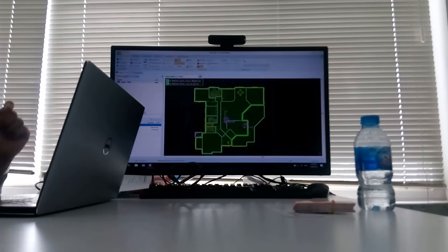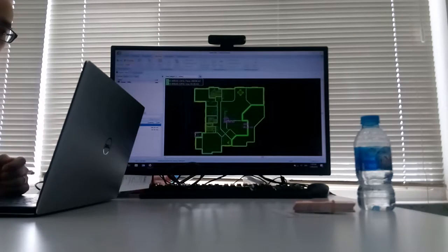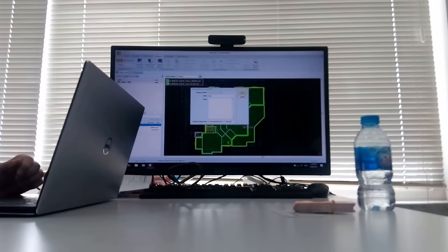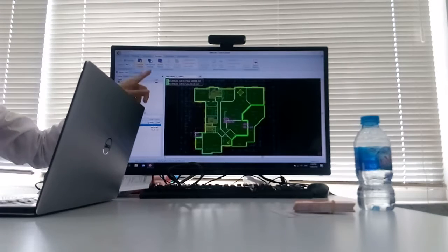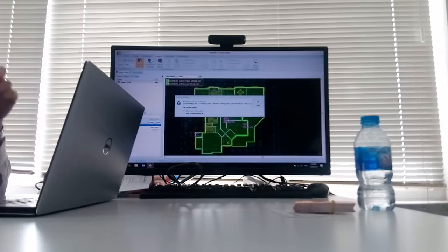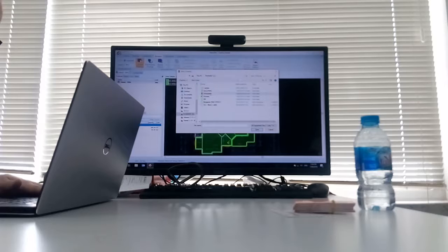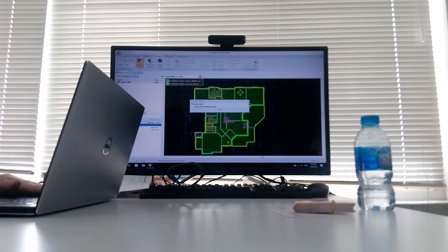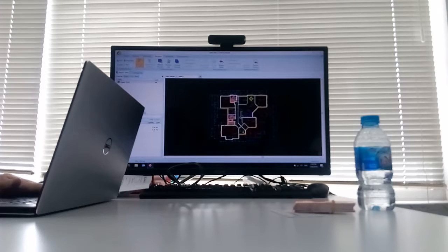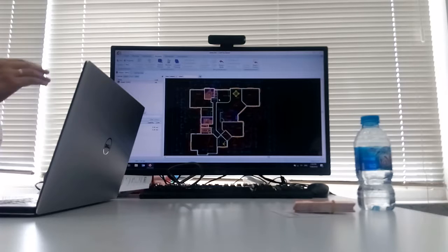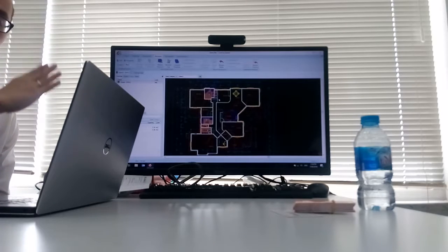Once you complete the initial measurement and want to revise this area, you click the add button. This is my second revision. You need to promote a drawing, which means you select the new or revised drawing, so it's a new drawing file. Let me go for the file. Okay, this is my layout number 2. Once I open layout number 2, I need to know what the variance is between the first and second.